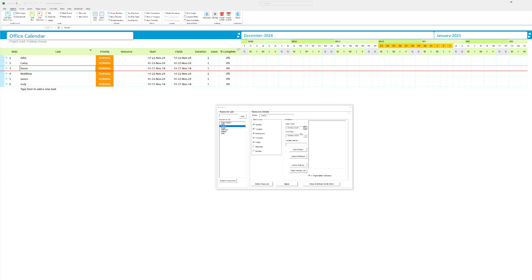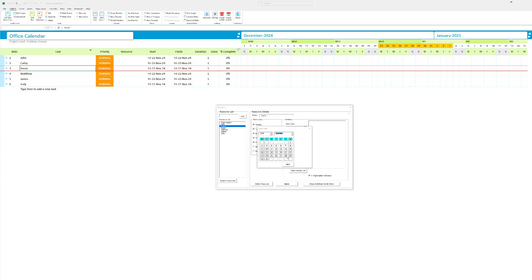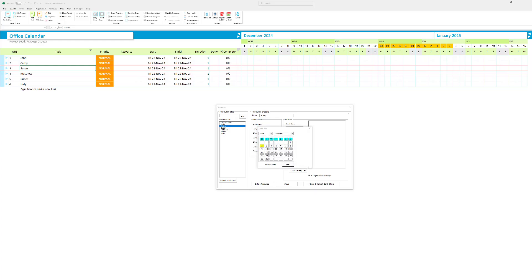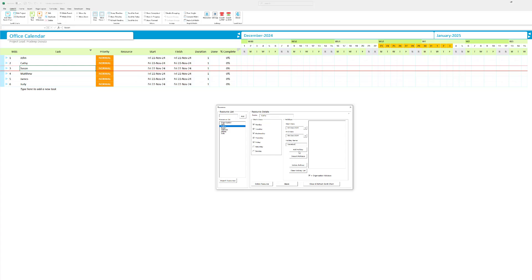And I'm going to go to the next resource. Let's go to Kathy. And Kathy wanted to go on holidays from December 2nd to December 6th. And let me just say vacation. I'm going to hit add holiday. Don't forget to hit the save button. I think I didn't save John's holidays. Yeah, actually I've saved it.